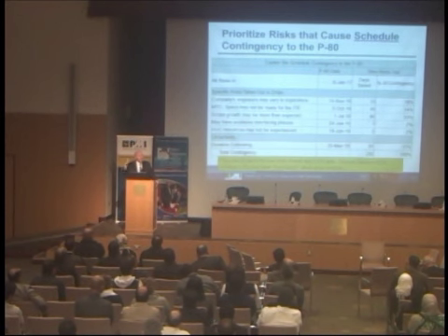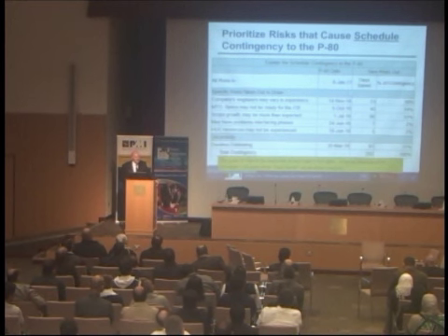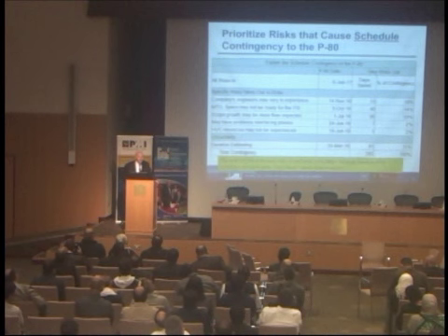So you might have to put that risk back in and try another one and check the 80th percentile date and take that risk out. And you try all the obvious suspects, and you find out that one of them, when you try it, has the earliest 80th percentile date. That is arguably the most important risk at the 80%, and you know that it saves you 53 days.